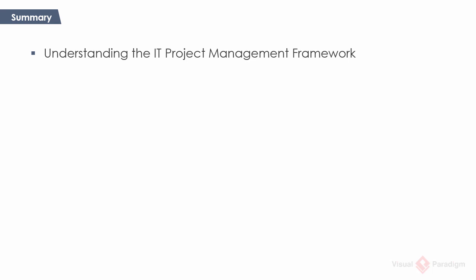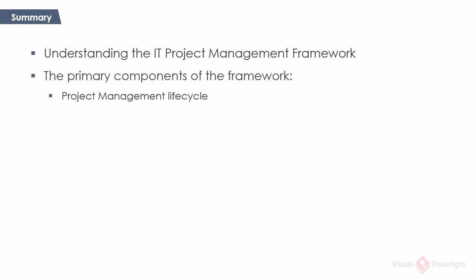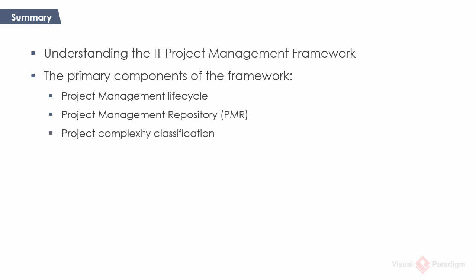The framework comprises three major components: the project management lifecycle, which consists of five distinct project phases where each phase contains a related set of activities that yield a set of project documents; the project management repository, which is a place that holds project documents and other project resources; and the project complexity classification, which helps you determine the project's complexity in order to find out the set of activities and documents to be accomplished.